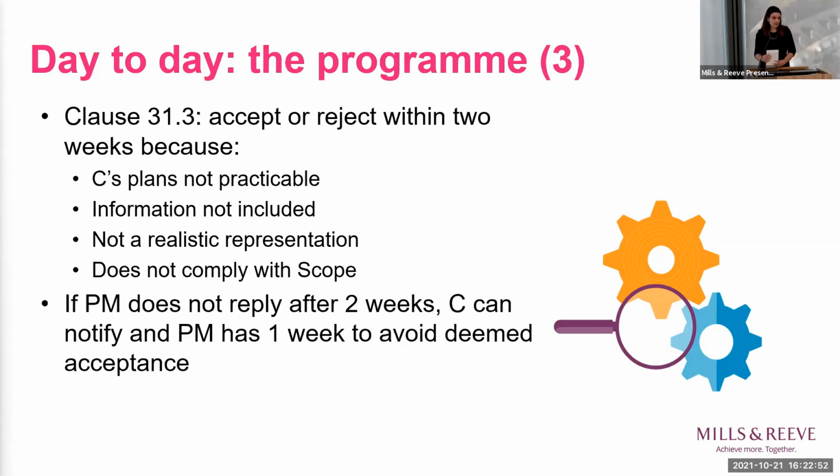The project manager has 2 weeks to accept or reject with comments the programme, and it can do so for a number of reasons. Make sure that the reason it's rejected fits into one of these headings: not practicable, information missing, just not correct, or doesn't comply with something in the scope.